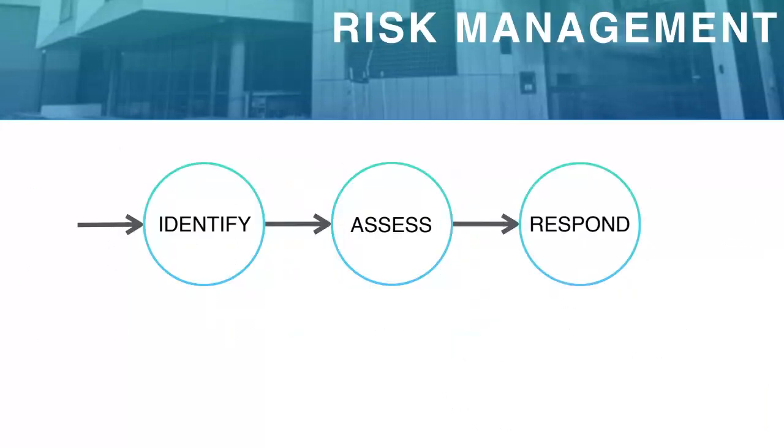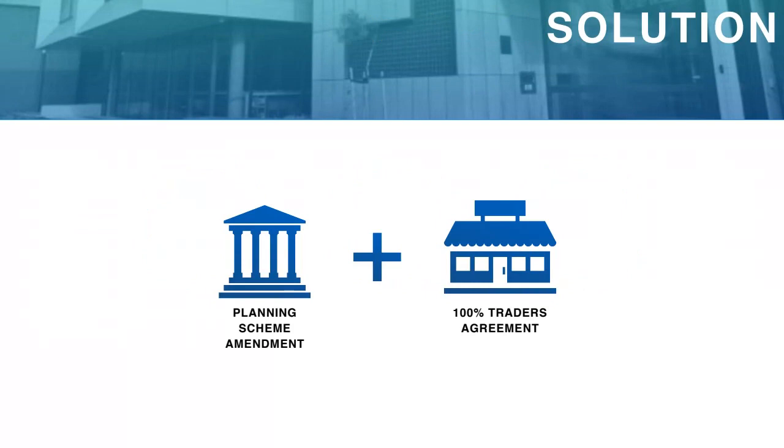That student went on and separated the risk matrix into the first stage of identifying and assessing, and then the other stage of the response, which that student associated with the solution as well. That is one way you can do it, because the mitigation measures in your risk are actually the solutions.